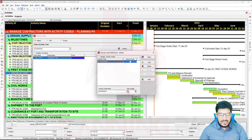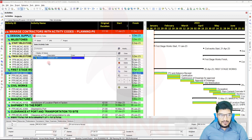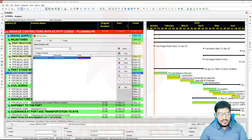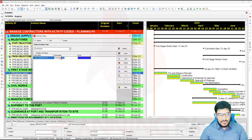If you want to write 'Contractor One' during assignment and want to see the complete name, you have to increase the value to whatever you want. For example, I will write 25, then close it. Now I will be able to write the full name. So 'Contractor One' is there. For color, if you want to write here the contractor for engineering procurement, subcontractors for construction or specific work, you will write the specific work name and then under that add the contractor — for example, contractor for civil works, mechanical — and then under mechanical there are too many subcontractors.